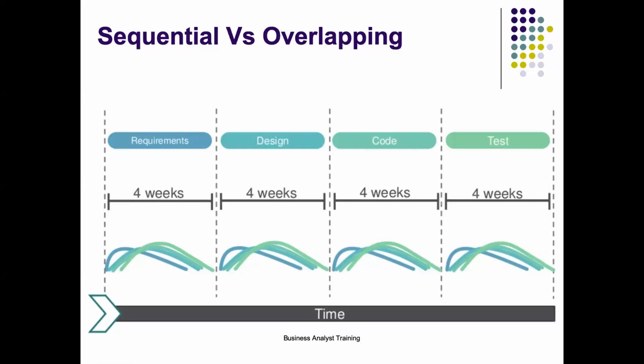We must not divide the work in such a way that it does not result in working software, or we are not doing a good job of dividing the work. In this example it's a 4-month project, but if it's a 4-year project, we have to do a good job of dividing it into 4-week chunks.